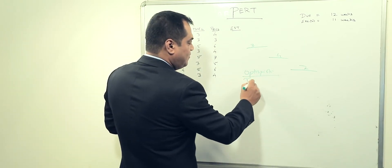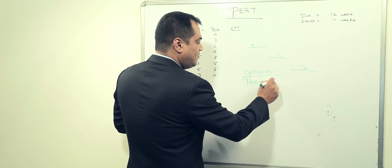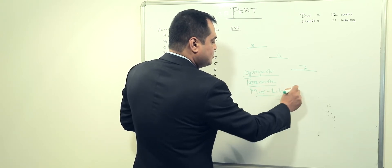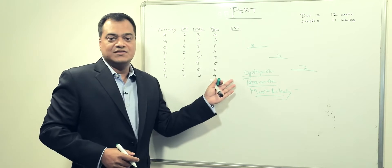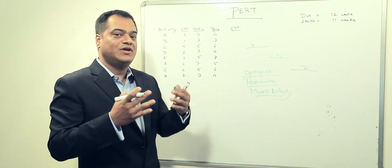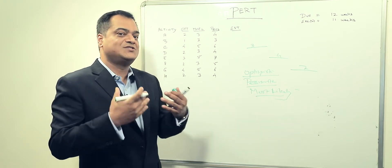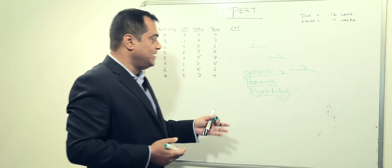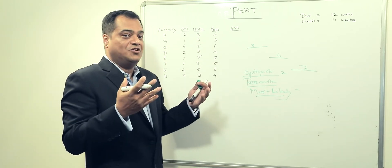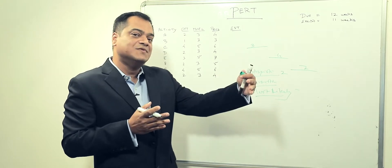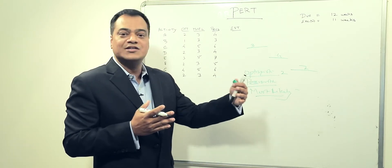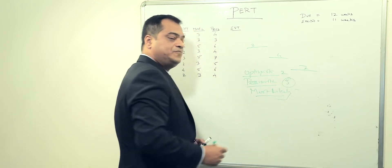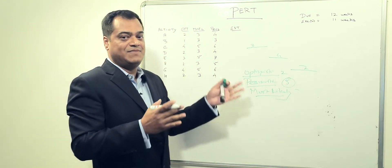Optimistic is something we think we can do in a much shorter time, so we come up with a small number. For example, we think we can do this job in two days, so we put two for optimistic. Pessimistic is the maximum time we may be working on a particular task — let's say pessimistic is five days.